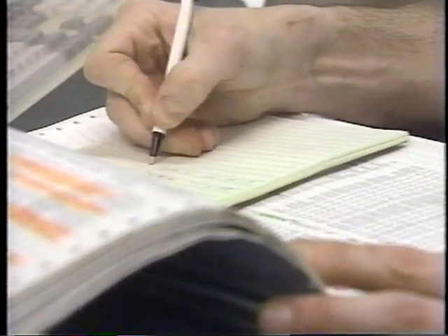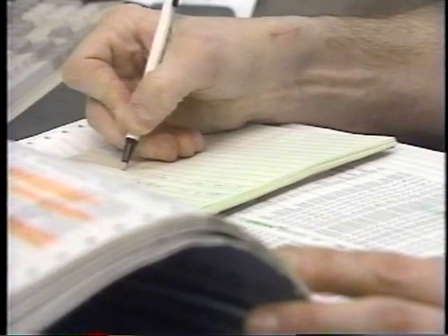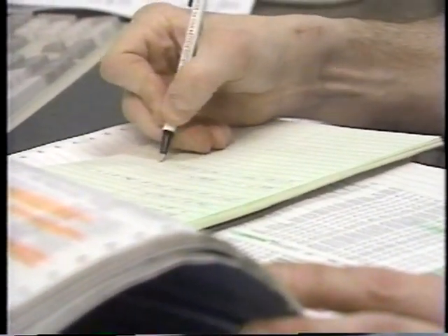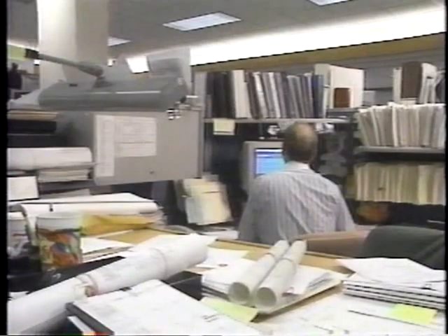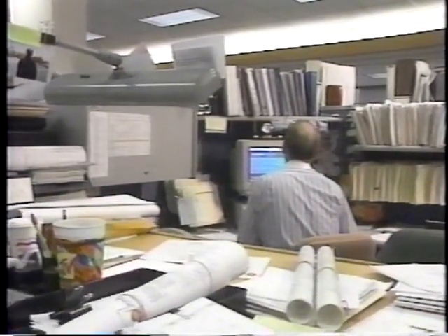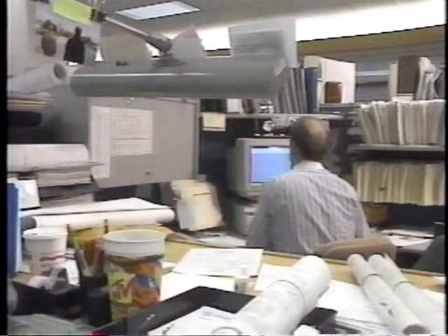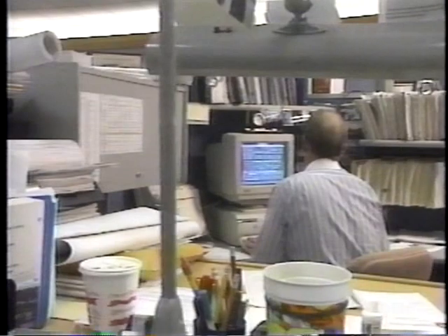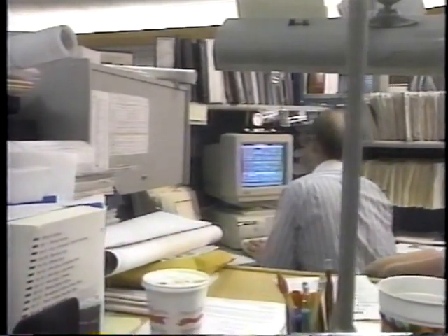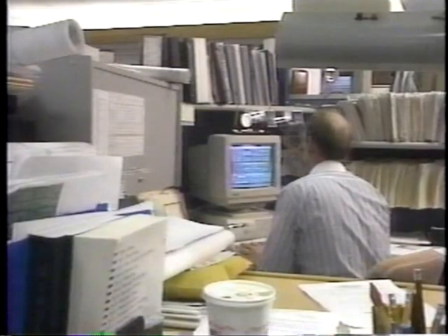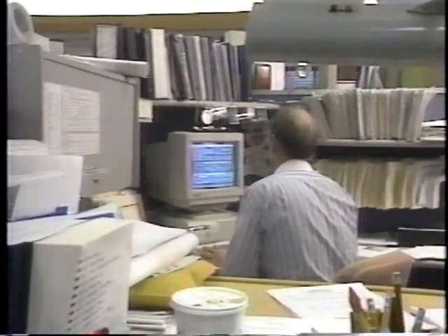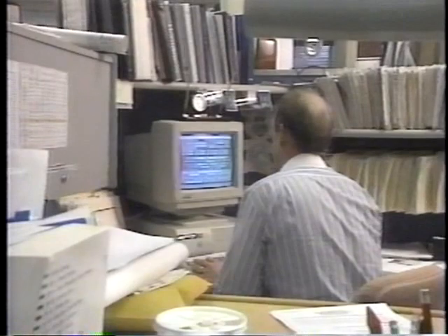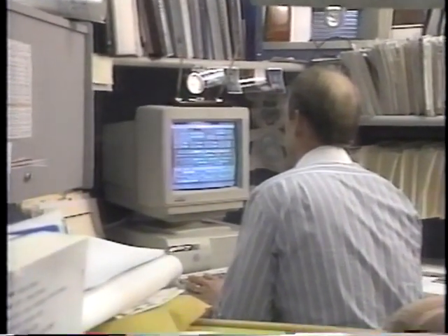Standard costs are developed to simplify preparation of budgets. The standard costs should allow for labor and other expenses necessary for contract support. Labor costs should be based on the actual average annual salary paid for each classification. These costs should contain base pay, fringe benefits, and any anticipated pay raises. An additive can be computed to allow for estimated overtime costs.